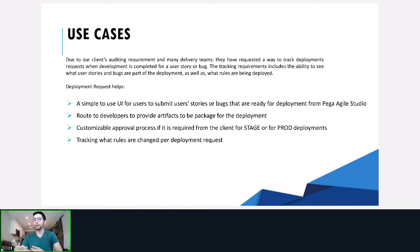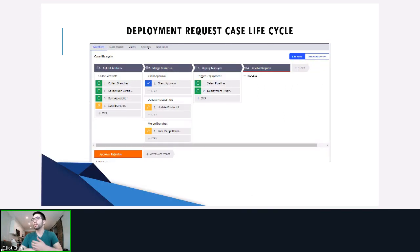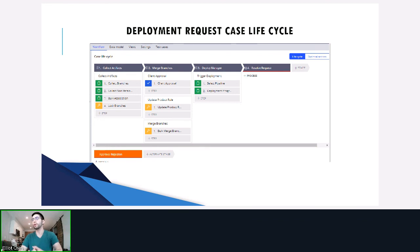In addition, it provides a customizable approval process in case you need stakeholders to approve the deployment — for example, an emergency deployment to production. There are four stages to the deployment request lifecycle: collecting the artifacts, merging the branches, obtaining client approval if needed, and then integrating with deployment managers to select your pipelines, trigger the deployment, and track the progress of it.